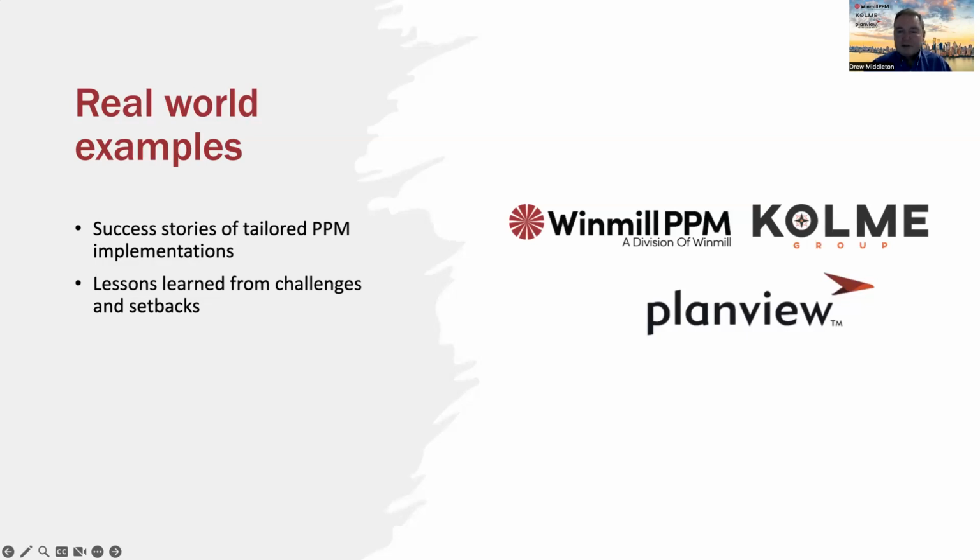Now, some of the things we've learned, we tried to do an implementation for an organization that had 15 different PMOs. They were a massive enterprise organization. 15 different groups were managing projects in their own way. And somehow they all came together and said, we want a PPM, let's do this. But trying to boil the ocean was not a good solution for them. Now, fortunately, we were able to advise them and very quickly get them to pivot and say, let's find an early adopter group. Let's work with that group.